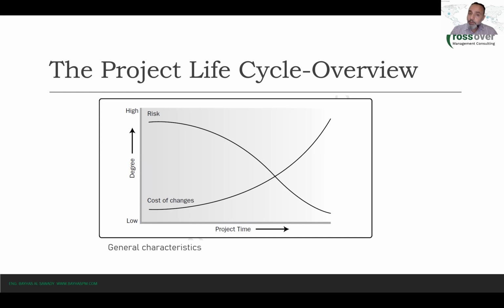At the beginning of the project or at the end of the project? What do you think? When is the cost of a change lower, at the beginning or at the end of the project? Yeah, the logic states that when we are at the beginning of the project, then the change that has been requested can be done without a lot of extra cost, because you just basically replace some design.